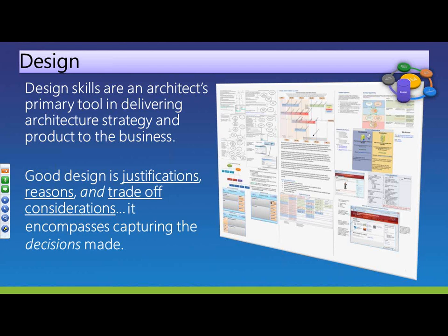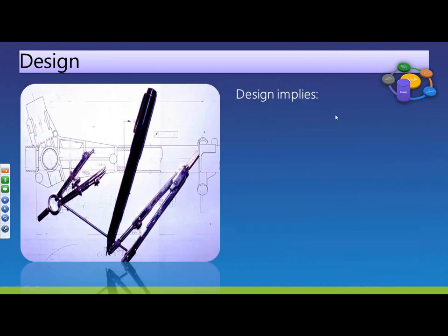What we ended up doing was keeping the 3 questions, but then we enlisted in a second phase a librarian that would come back and fill in the 15 taxonomy fields outside of the person asking the question, only because it was wise to have those fields, but you can't ask them at the time that they're in a crisis. That's a good design concept, if you will, and because we had our justifications and reasons documented, we were able to postpone that to the second phase. It's just an example.